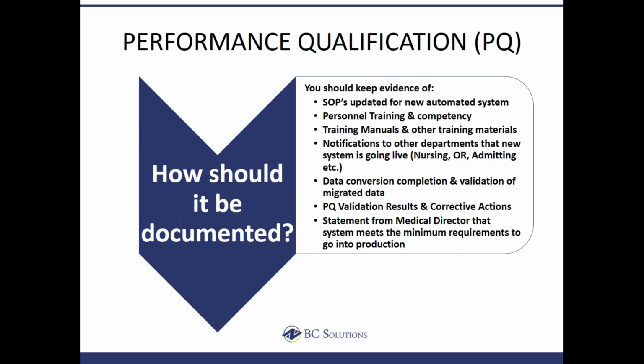And how should it be documented? Well, this is going to be a little different than OQ because your SOPs provide a lot of your documentation, your personnel training records and competency records, training manuals and other training materials that you use, any notifications sent out to the rest of the facility letting them know that your new system will be going live and how that will impact them is part of this documentation.